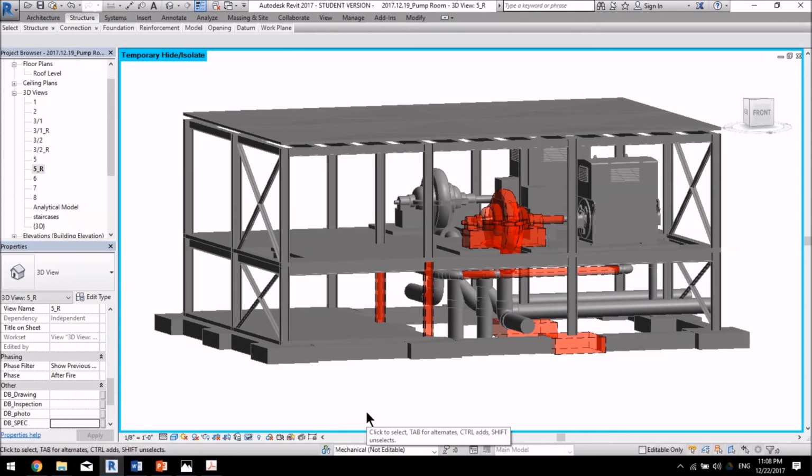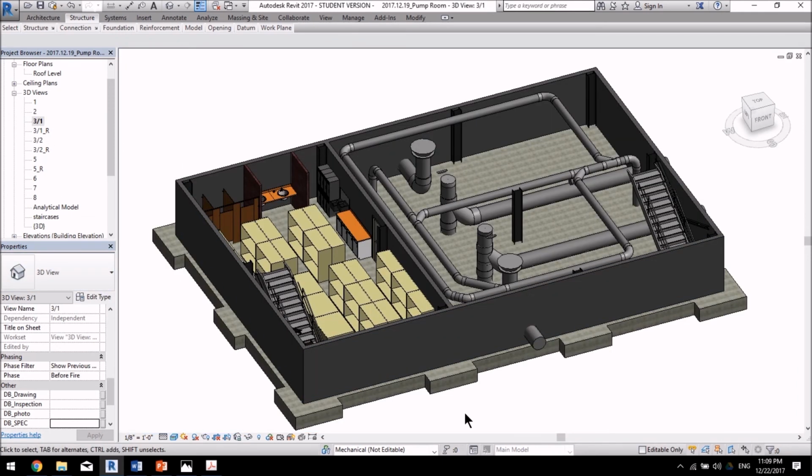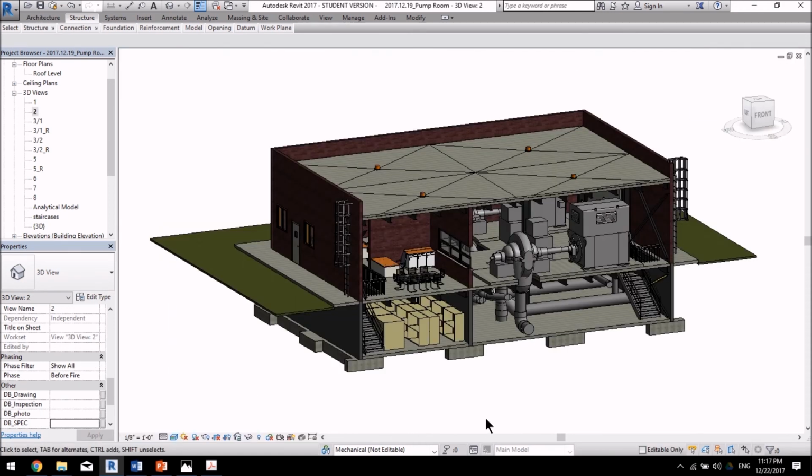The client had not removed the shelves from the storage room, a condition specified in the contract, but also issued the notice to proceed for welding while the containers with the combustible materials were on the shelves, which is against the obligation of the standard for fire prevention during welding, cutting, and other hot work, therefore adding to the intensity of the fire. Further, the accessibility for the firefighters to the incident area took longer than expected and led to more damages.